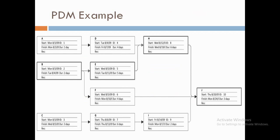As an example, activities A and D have a finish-to-start dependency: activity A completes in one day on 3/8/09, and only after that can activity D begin on 4/8/09. Likewise for all other activities, the project is completed after all activities and the last activity J is finished.